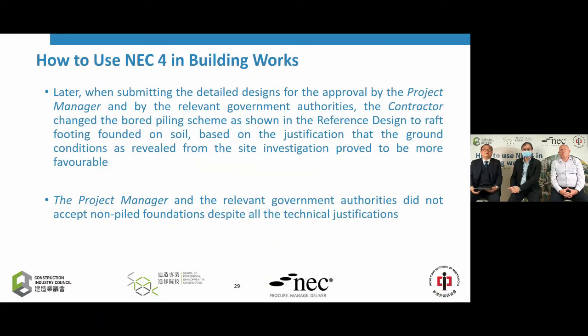Now, later, when the tender was awarded and we find a successful tenderer, who becomes the contractor, during the construction stage the contractor proceeds to develop the design. And then at one stage, the contractor submits a design for approval by the project engineer. And also, as required by the contract, they have to submit the design for approval by the relevant government departments.